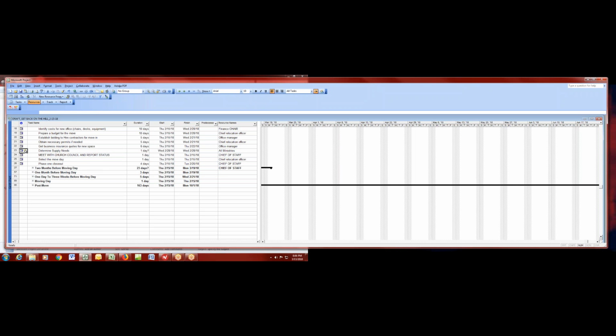If you notice to the right, this little icon right here is an actual notation, and we can add various bits of documentation to these particular links. So I can double click that. You'll see general information, the name of the task, the predecessors, which we don't have for this one, and the resources that are going to be used. We have an advanced tab, and this tab, notes, is where we can write notes. So this particular one, determine supply needs, we put a note in here that is of extreme importance. And also we have a custom field that we can modify and change.